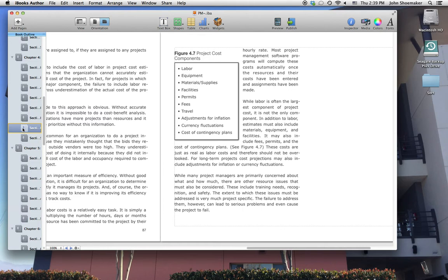You can also go back and look at previous records. Many of these work packages are not unique. Some work packages appear in project after project. You can go back and look how many man hours did it take last time we did this particular work package. We can talk to industry experts. Some trade associations have standards for man hours for accomplishing certain types of work. So there's a wide variety of ways that we can do this.